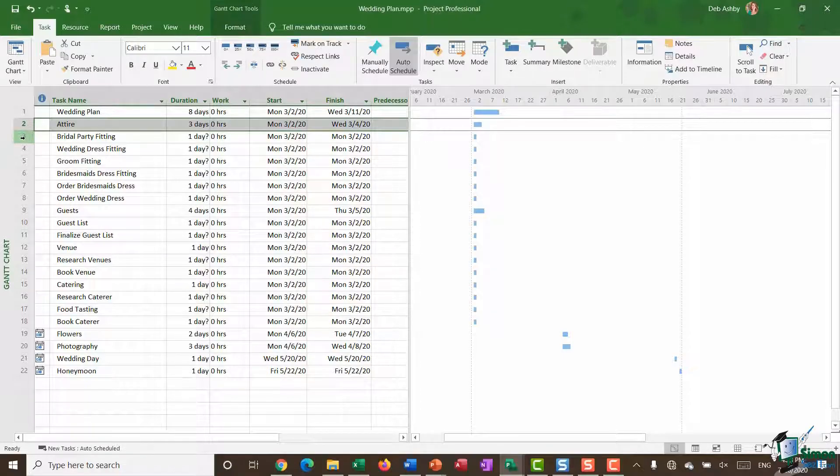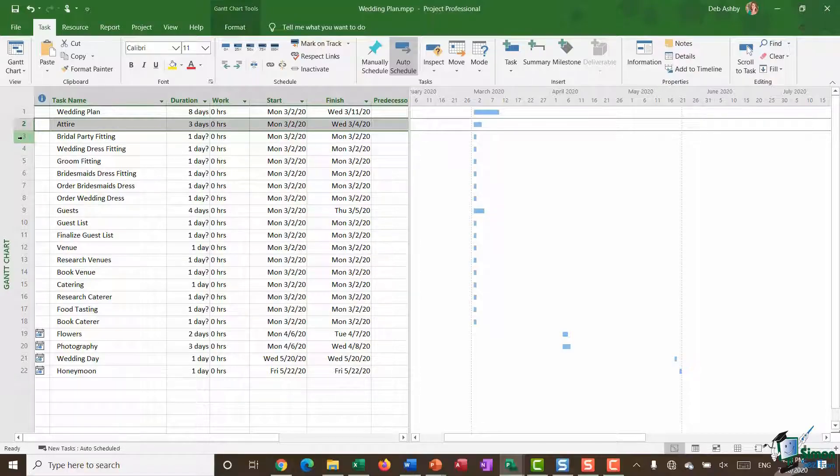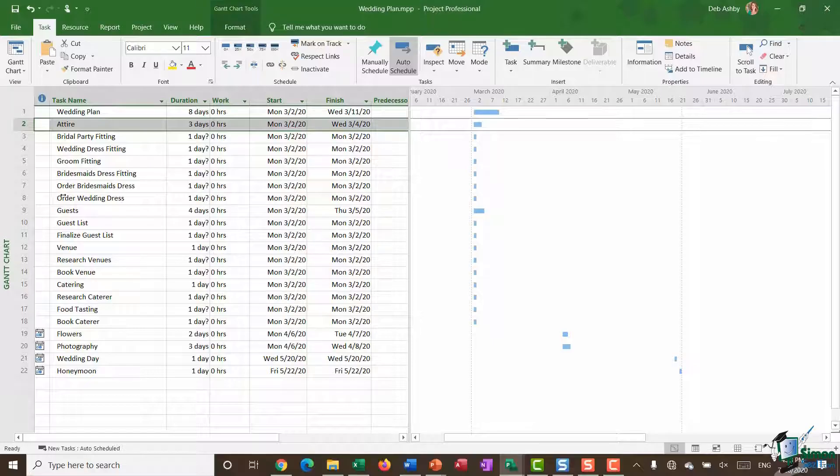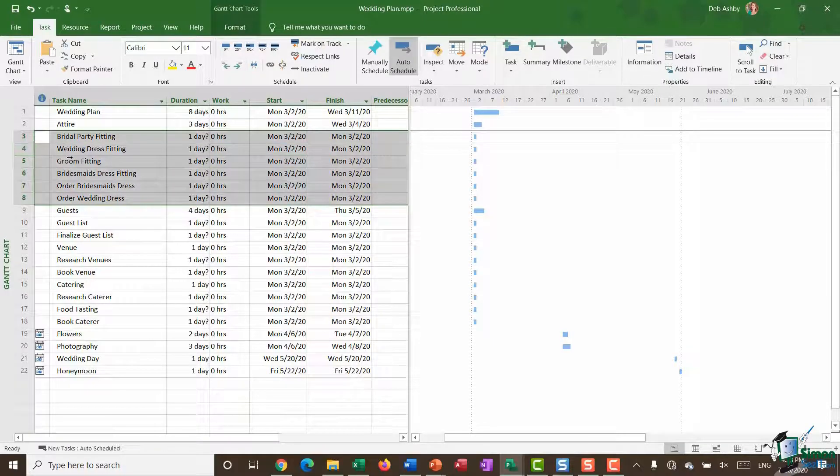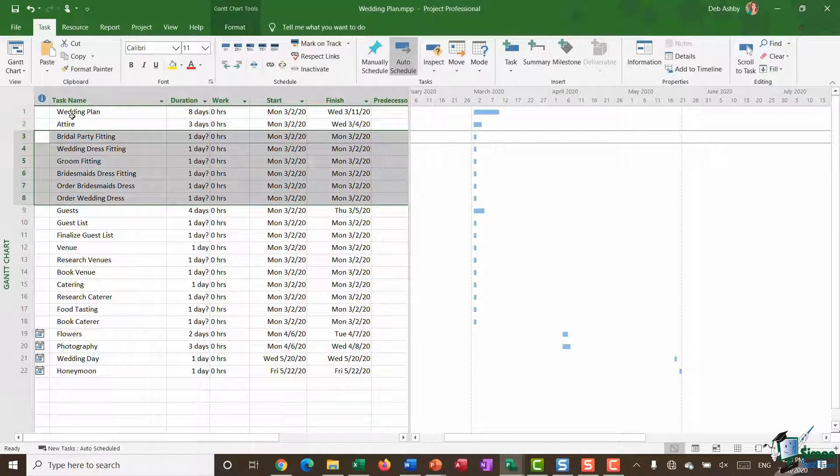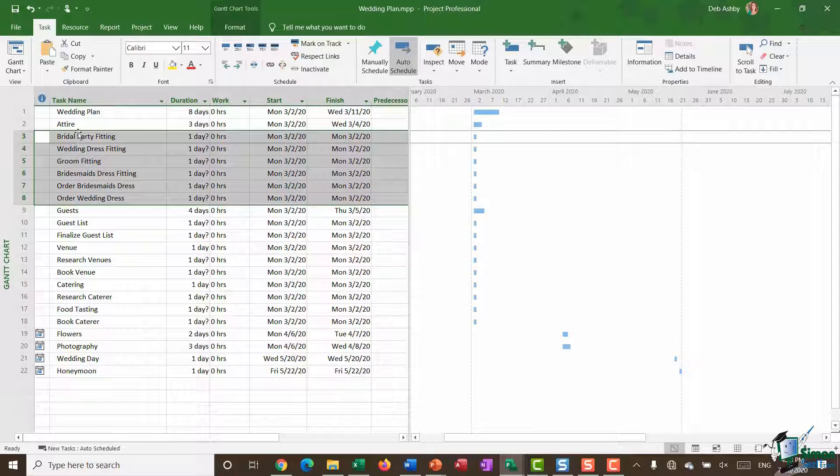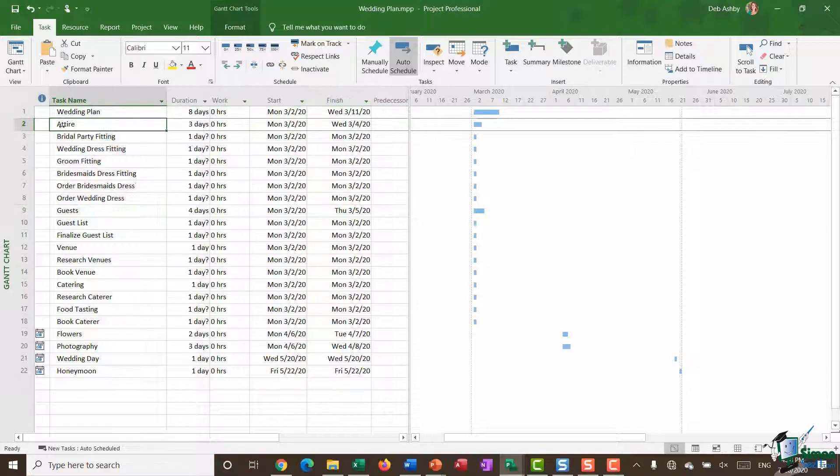And then underneath there you can see I have some similar related items. We have bridal party fitting, wedding dress fitting, groom fitting, bridesmaid's dress fitting, and then I have some other tasks: order bridesmaid's dresses, order wedding dress. Now all of these technically fall under this attire heading. So I'm going to give this a little bit more structure, make it easier to read by making some of these items subtasks of attire.